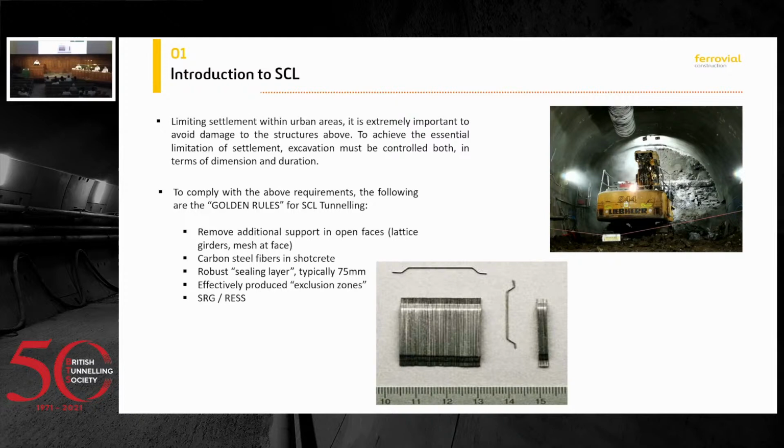So we go through the SOG, a meeting with everybody involved in the tunnel, who need to take the decision from the data that we are receiving, so monitoring any settlement, any possible groundwater, and that's it. Then we produce the rest, that is kind of an easy sheet, where you can follow the next 24 hours excavation requirements. You brief your team and then you go for it.